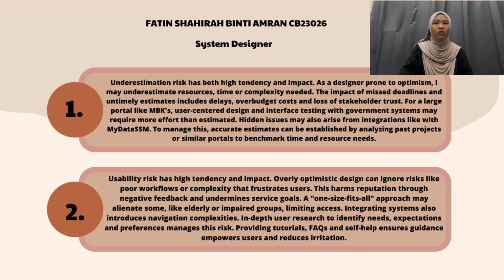Especially with a large portal like MBK, tasks like user-centered design and testing with government systems could be more demanding than expected. Integration with systems like data SSM may also reveal hidden issues. To tackle this, I aim to make accurate estimates by learning from past projects or similar portals, helping us better predict time and resource requirements.